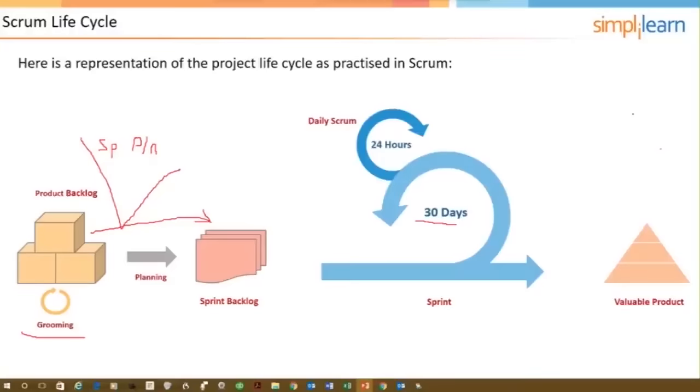There will be a daily scrum, like we did at the beginning of our workday together as our team. And then at the end of the work of the sprint, there will be the sprint review. The sprint review meeting or ceremony is also time boxed, to 1 hour for each week of the sprint. So if we're doing a 4-week sprint, the sprint review meeting would be 4 hours in length. The primary purpose of the review is to showcase and demo the software and get feedback from relevant stakeholders and allow the product owner to say, I accept or I reject the work that has been done.